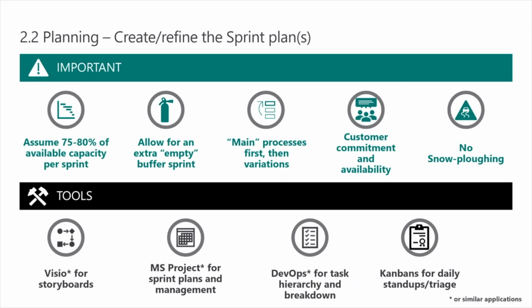So what you can't do is build up technical debt in sprint 1 where you say, I got blocked or I was late on these 5 things. Oh, not to worry, I'll just shove them into sprint 2, right? If you keep doing that, what happens is sprint 2 has another 5 things that couldn't get done. So now you have 10 things that carry into sprint 3 and so on. You end up snow plowing your technical debt further and further down the chain until you arrive at the last sprint and you have a sprint that is way over committed, right? There is no way you can deliver. And then that ends up in a project delay, and you have to say it towards the end of the solution cycle, rather than managing as you go through, right? That's never a popular thing.